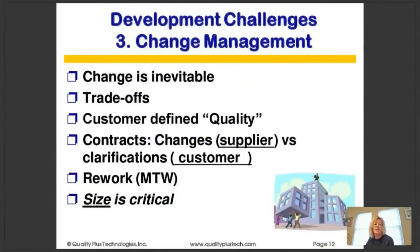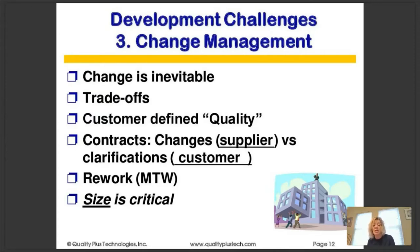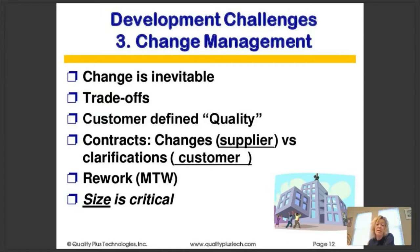The third challenge is change management. Change is absolutely inevitable — there will always be changes along a software development life cycle. That's part of the beauty of agile: change can be managed, introduced, responded to, and extrapolated. But there are always trade-offs. Whether on a firm fixed price or time and materials contract, if partway through development the customer says to stop building a particular report, there's time and energy already expended. We need to figure out a way to trade off against the budget, scope, time, customer-defined quality, and contracts.